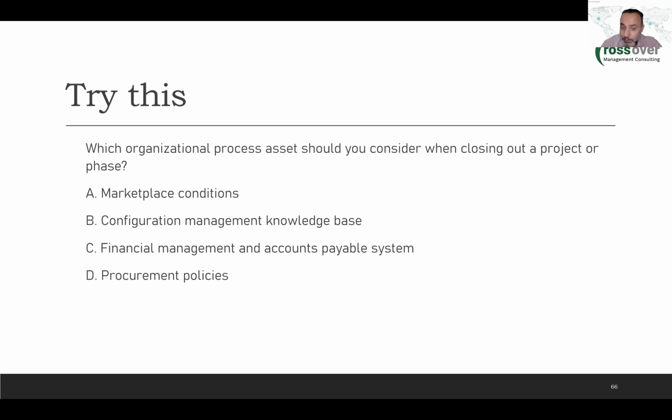Again, notice, this is very important for you to note, okay? The systems that we have in the organization are internal factors that affect the project. They are EEFs, not OPAs. The procurement policies, are they OPAs? No, again, because those are policies for the procurement, not for the project management. The OPA, if you can remember, are two things only, two groups.